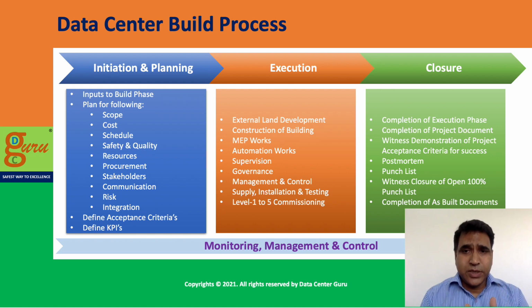And 80% of the time is supposed to be taken by the execution phase. However, what I have observed in this industry is that the closure phase is taking almost equal time and even more time than the execution phase.